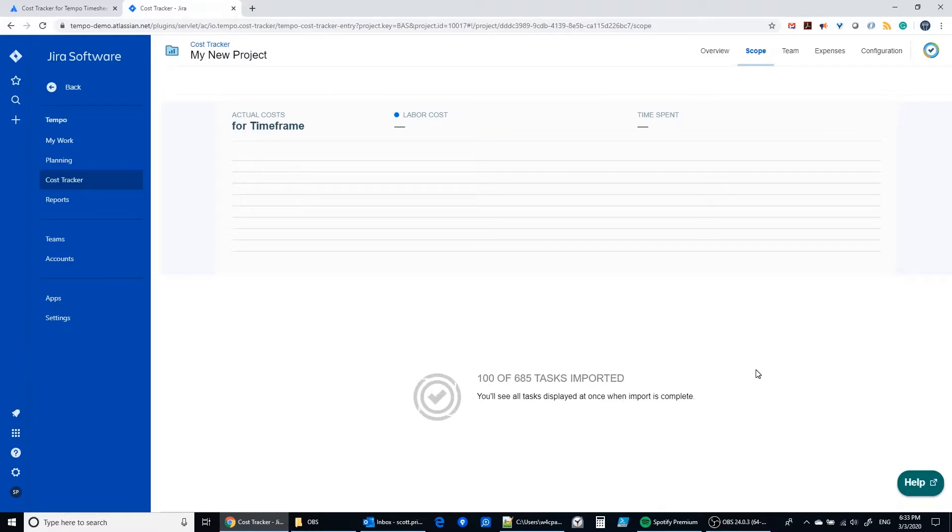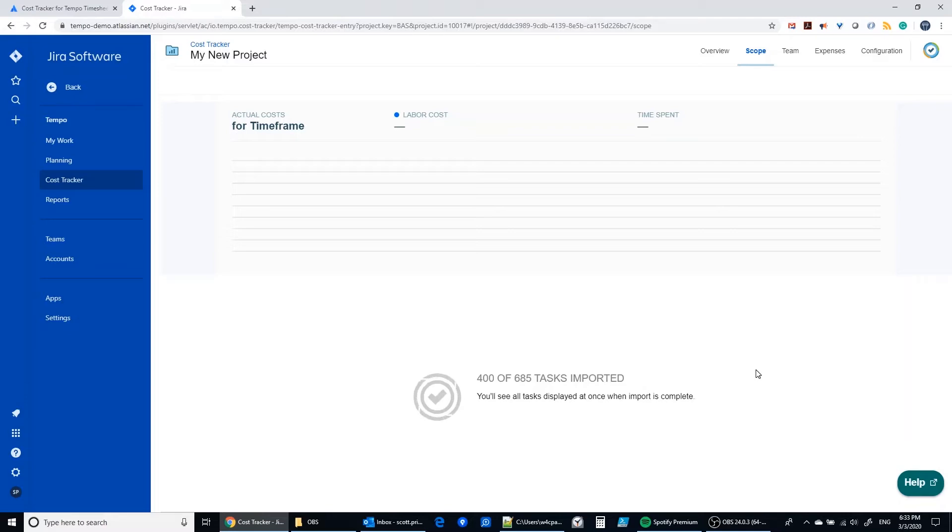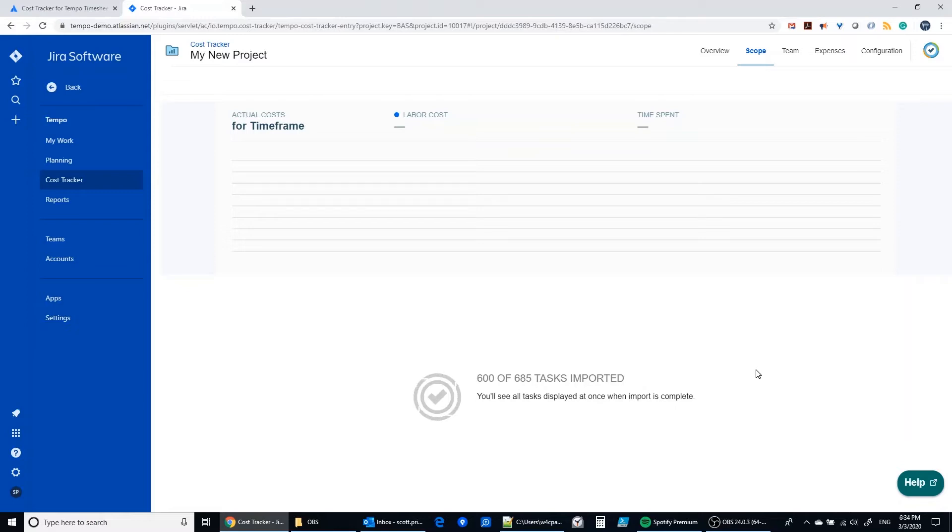So right now what cost tracker is doing for this new project based on the filter that I selected is importing 685 tasks that are a part of the filter. So what it's going to do is grab all that data and start looking at the time logs associated with those. And it's going to start applying that default rate of $90 an hour that we put in, and apply that to all the time that's been logged against those issues. It's going to give us a graph showing the impact of those costs over time.